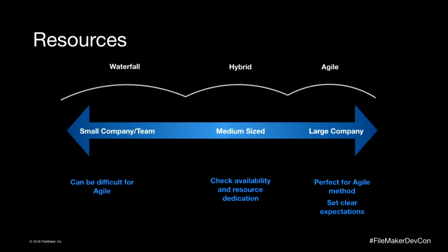If you have a very, very large company, you have the opposite problem. You might be forced to have too many decision makers on your team. And then if you're pausing to have 10 or 15 people make a decision about where to go in the direction of your build, you've stopped your entire process and you've now gone into requirements gathering and you're in Waterfall, you're not in Agile. So you have constraints on both sides of the spectrum here.